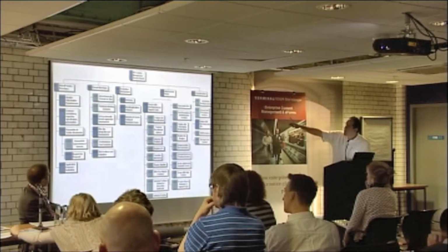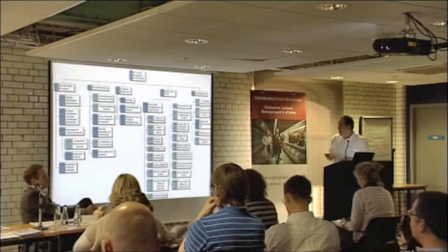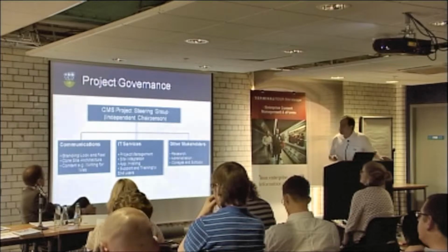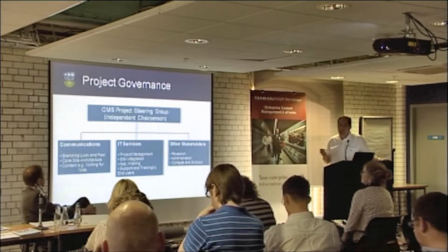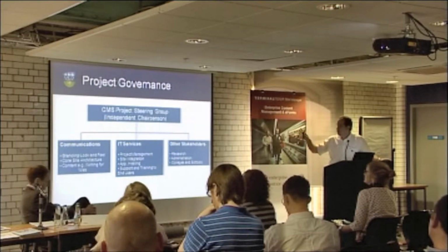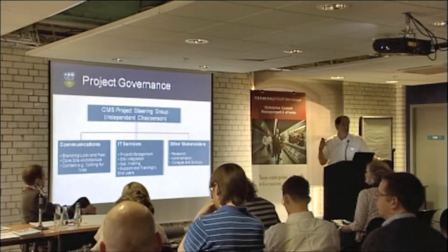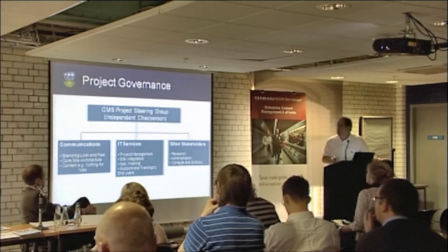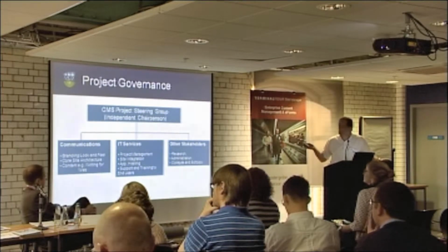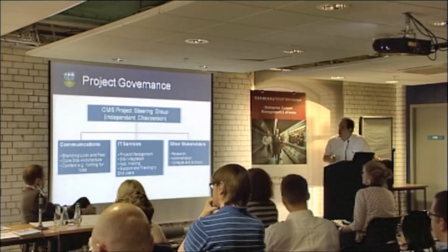The 2 areas I'm going to deal with for the rest of the talk are the actual rollout and communications and governance as well. I'll take governance as the first one. At the very start of the project, before we went to tender, we set up a steering group with an independent chairperson. The main drivers for the steering group were ourselves and IT services, and then the communications office, from the perspective of content design policies and so on. We also included stakeholders from the outset, representing research administration and our colleges and schools. So we had about 16 people on the steering group at the start.